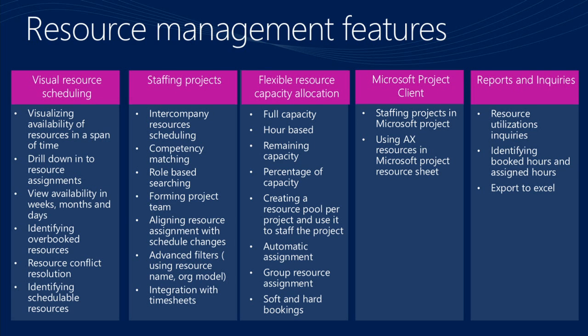Identifying overbooked resources. Well, overbooking is something that happens quite often in consulting businesses, right? People are working on multiple projects. Sometimes overbooking is not healthy. Sometimes it is healthy because you can work on multiple projects. Here we are providing a view into easily identifying the people that are overbooked and being able to drill down and find out why. And if those resources should be canceled or changed, you can easily do that as a resource manager.